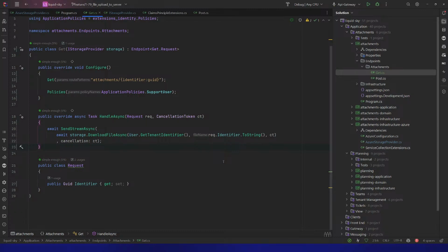And if the feeling is that the team is not being accurate enough, then what you do is you reset. And yeah, it throws out estimations, but you reset and review your baselines. Because the idea would be that within a sprint, the team is confident they can get the work done. So they say, we can take on 10 points worth of work, say, right? So we've got three threes and a one, right?